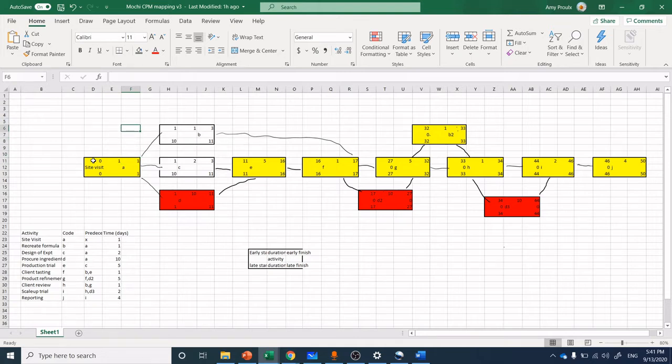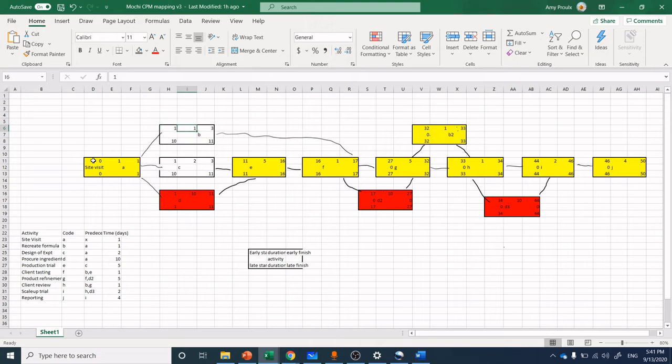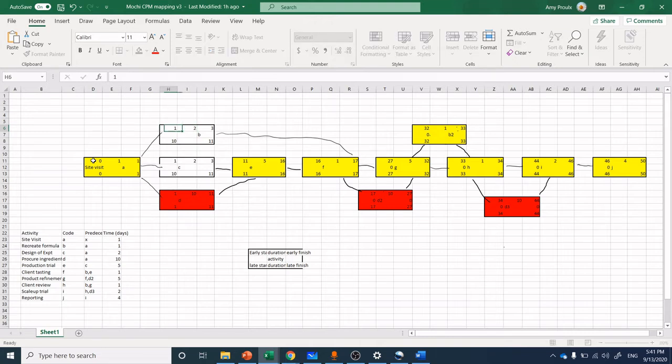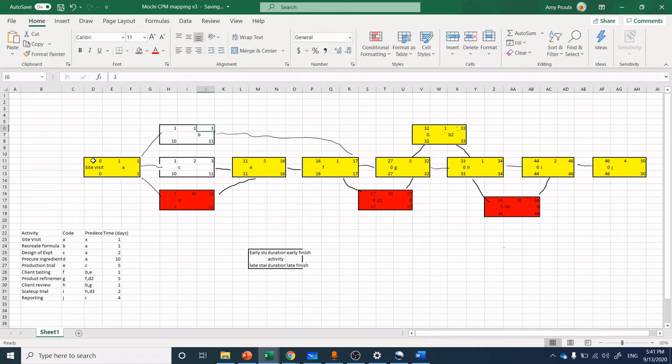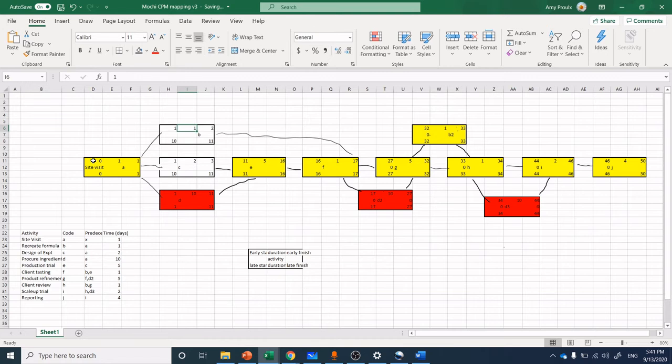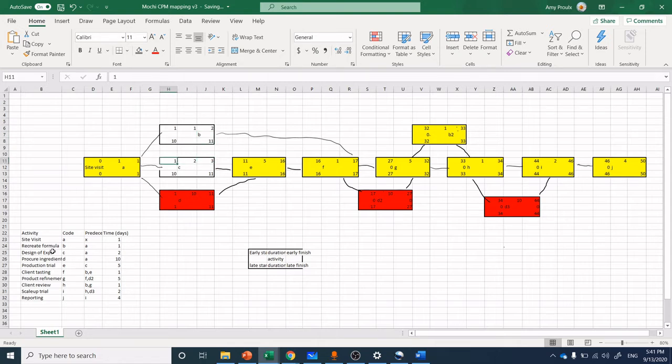From there, we can jump up to, we start on day one, it's going to take, wait a second, it says, oh no, I may have mapped this out incorrectly. So I think I had it at one day, but I had adjusted these numbers up and down. So that's ending on day two. So we start on day one, it takes us one day, and therefore we end on day two. On this activity, which is activity C, design of experiments, let's say it takes two days. So we start on day one, takes us two days, and we end on day three.